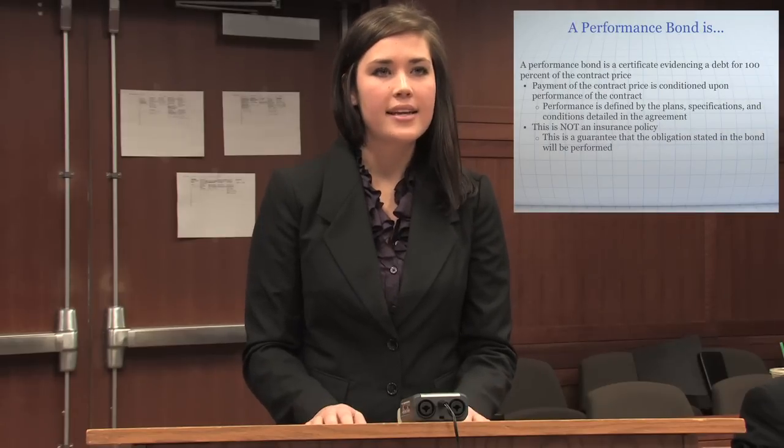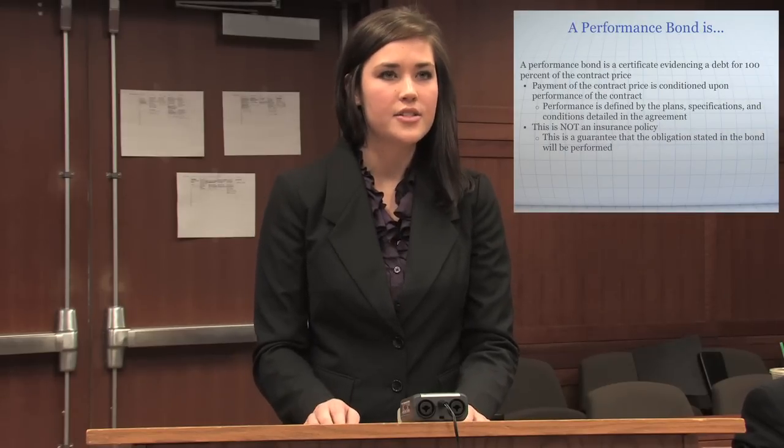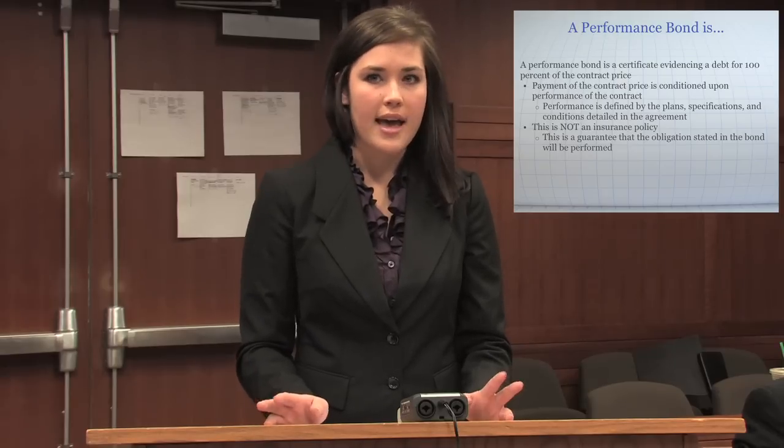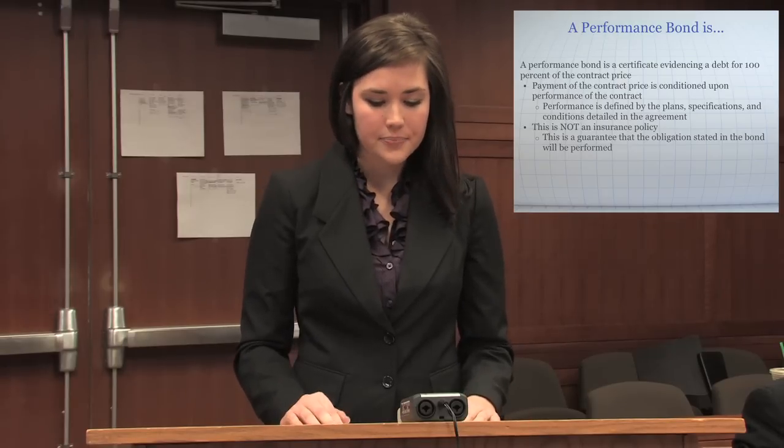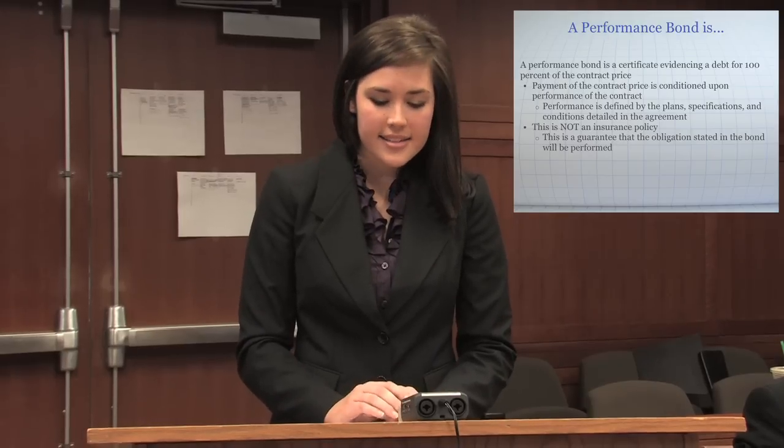One of the easiest ways to talk about performance bonds is what one is and what one isn't. A performance bond is a certificate evidencing a debt for 100% of the construction contract price — no more and no less than the price stated in the contract. Payment of the contract price is conditioned upon performance of the contract. If the contractor fails to fully perform, the obligee has no obligation to front the price. Performance for a performance bond is fully defined by the plans and specifications that the parties have bargained and agreed upon in the contract.